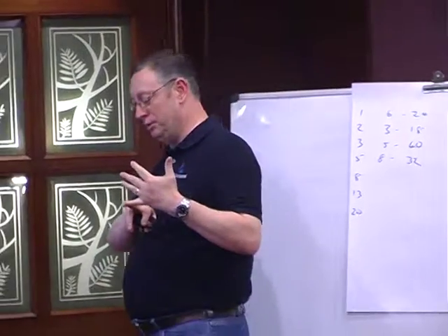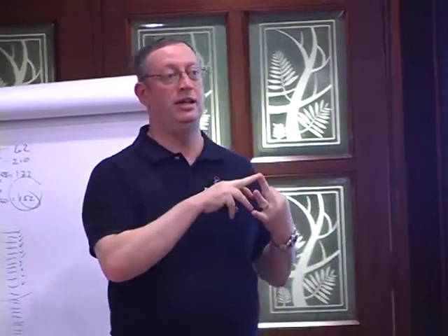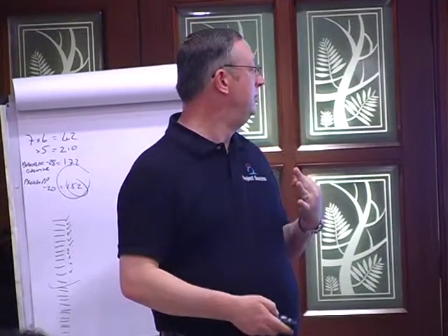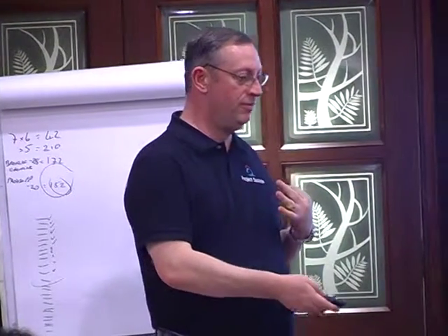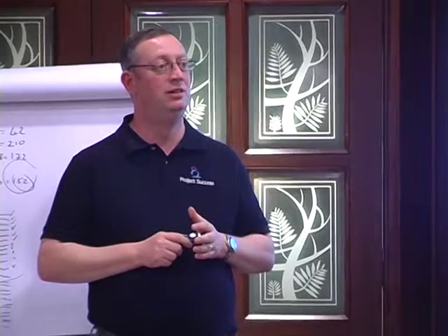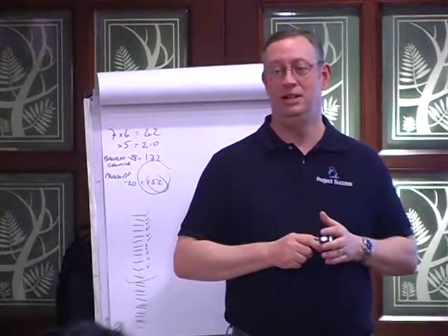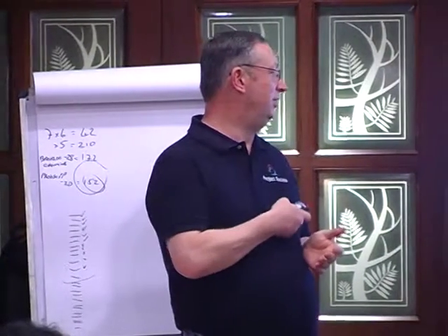So you've got the daily scrum as the inspection loop for the sprint backlog, for the plan. You've got the sprint review as the inspection loop for the product. And you've got the retrospective as the inspection loop for the team. They are the three big inspection loops. Any questions on the retrospective? Well, that's it. There are some useful books.